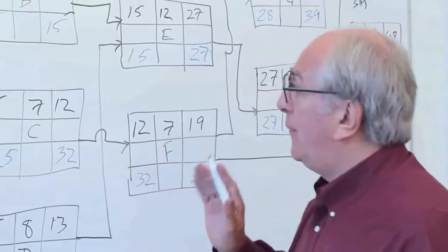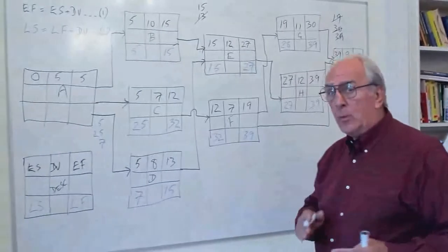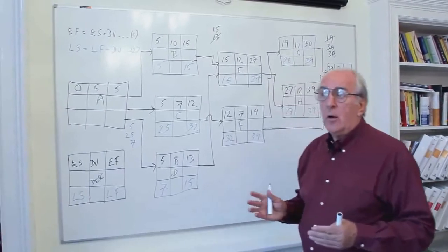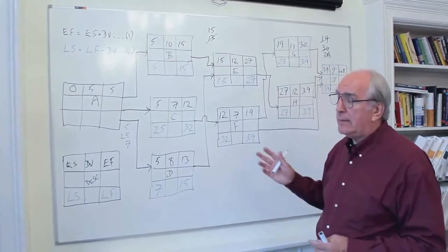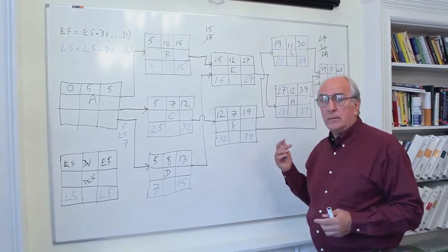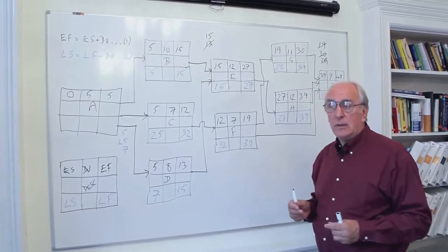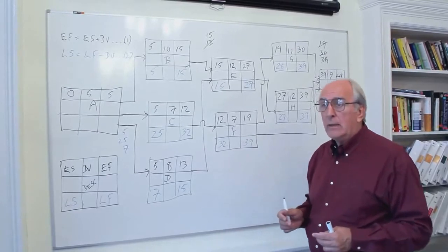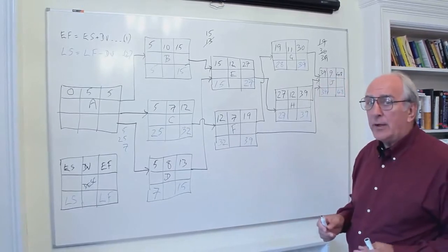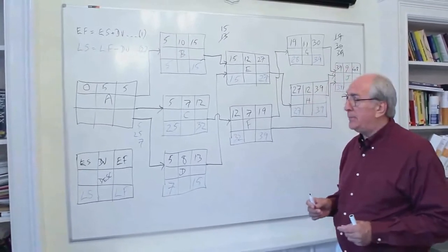And when we did the forward pass, we had to choose between two of these. We took the maximum. And we can reason ourselves through why we should operate with a choice in this situation. And we could do it simply. We could say we were moving forwards and we took the maximum. So now when we're moving backwards and subtracting the durations, it's probably the opposite of that. So it'll be take the minimum going backwards. We'll park that as a very good estimate of being the right answer. And let's examine it with a bit of reason.